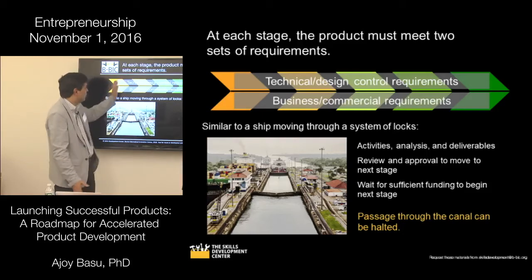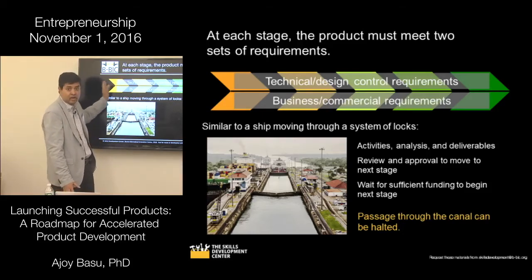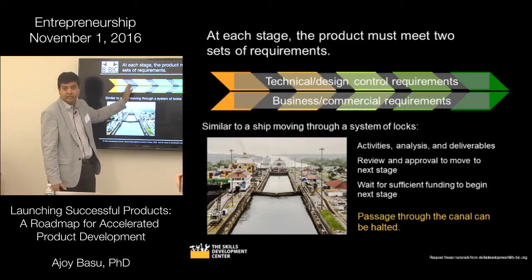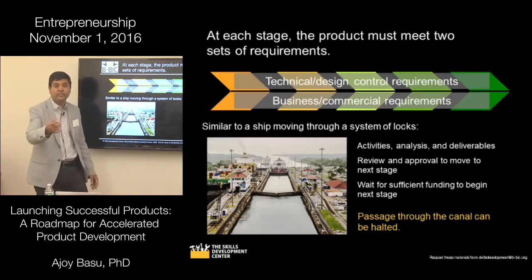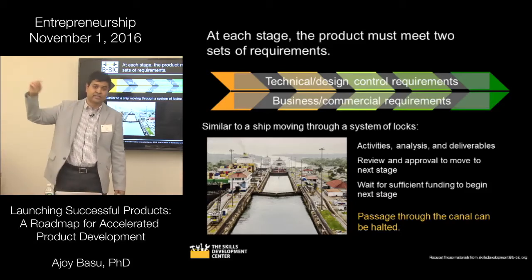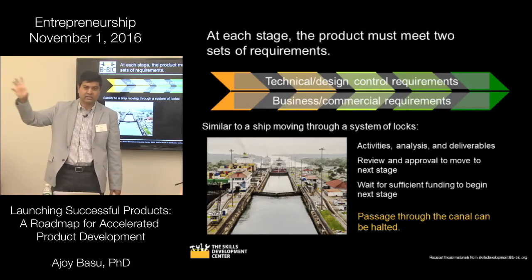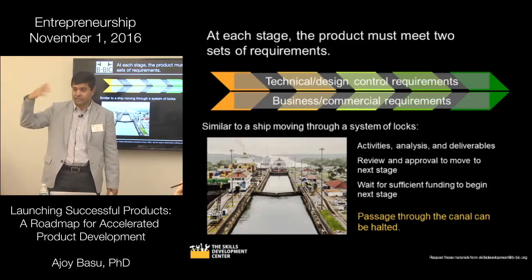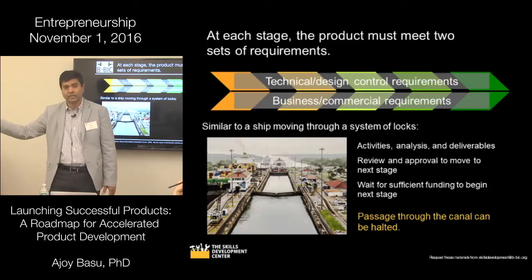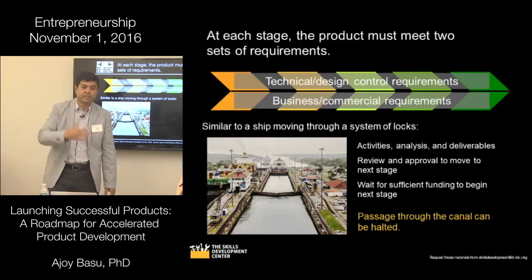You don't go from one gate to the other until all the deliverables are met. And even if you do it with a known risk, like engineering is only 3 months away, all right, we'll assume that risk and go to the next stage.